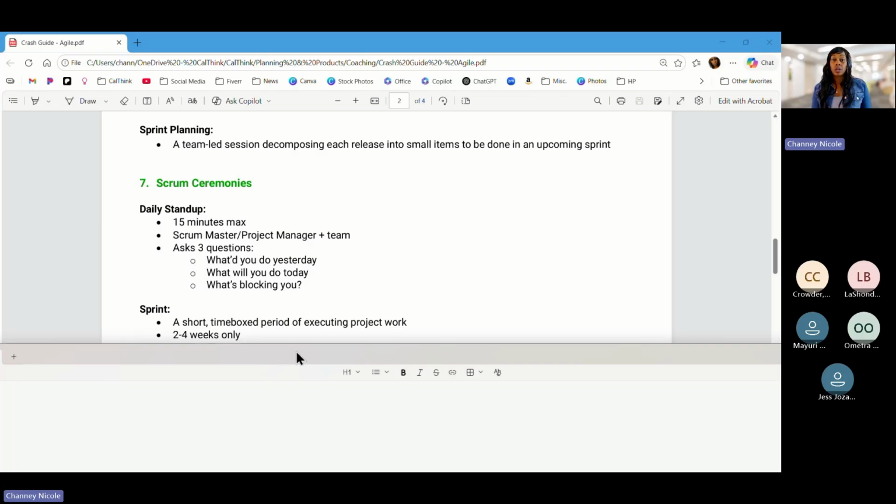And you might get a question about stakeholders are frustrated because they're not seeing enough updates. They're only getting to see the product every other month or every 6 weeks. The answer is going to be to bring that sprint back down to 4 weeks or 2 weeks or something shorter that fits within the parameters. So 2 to 4 weeks.